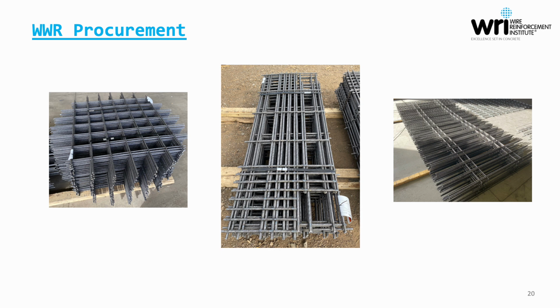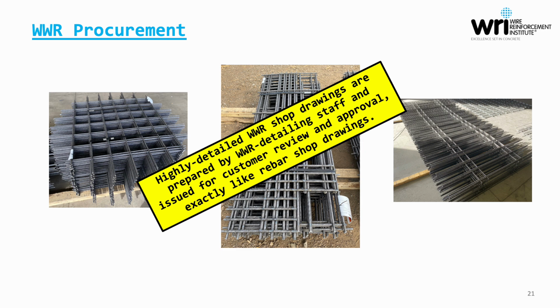Here are a few photographs showing some examples of custom material. Obviously, these are arrangements of wires that, if you were just to go by the written description or by the style, it may not be enough to tell the full story. So when you get into structural material like this, you are almost certainly going to see it accompanied by a shop drawing for approval purposes. And again, this note just reinforces that. You're going to see detailed shop drawings accompanying this material, and all of the WRI member producers have technical staff that actually generate these shop drawing submittals, no different than what you see for rebar submittals.